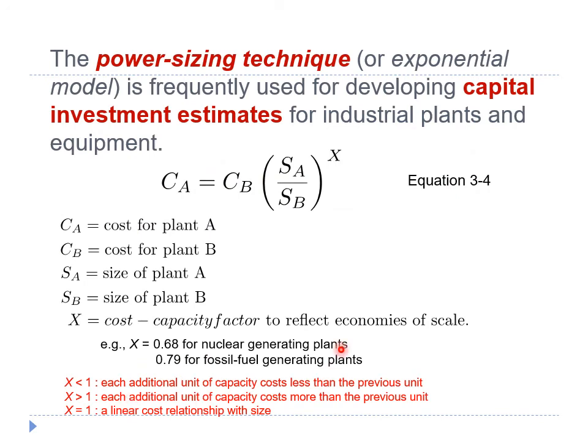The power sizing technique, which is also known as the exponential model, is frequently used for developing capital investment estimates for industrial plants and equipment. This cost estimating relationship recognizes that cost varies as some power of the change in capacity or size as given by this formula.